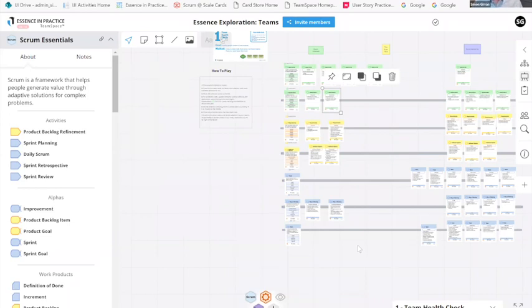So that's a very good kind of anti-pattern for agile teams. If you've got a bunch of work up front, this is showing you very clearly that the people that really ought to be involved in these activities and moving these states forward have not been involved. So we quite often see a bit of an imbalance, and then it becomes maybe we need to focus on getting 2 or 3 states achieved further down before we start further up.